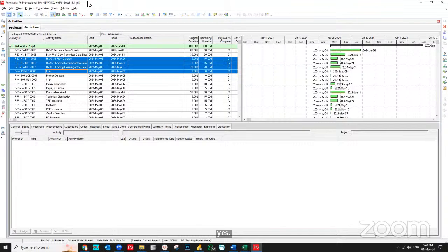It depends. For instance, if you have a small data model like mine, copy and paste is easier, or typing the formula. But I try to show both methods to you and the other participants because it is important to select the proper one. If you have 10,000 activities, 7,000 activities, or 2,000 activities, then copy and paste will not be a good choice.